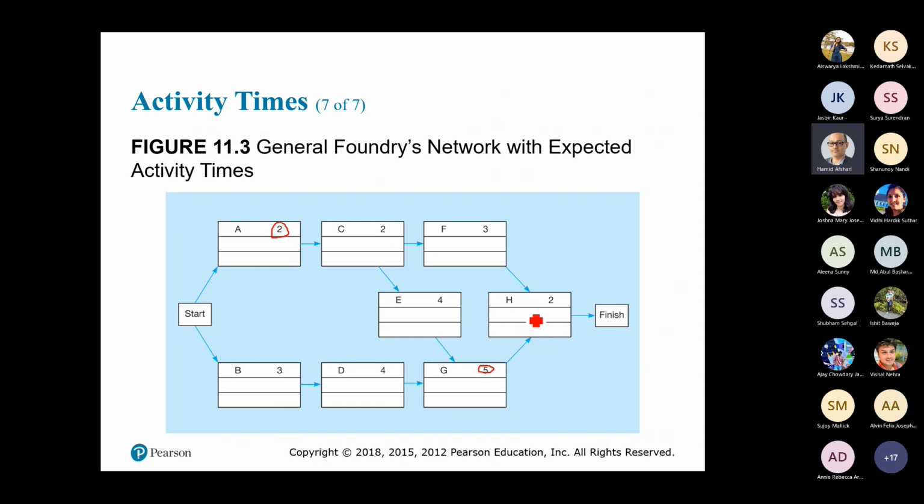Just pay attention that the two activities, start and finish, are dummy. They are not realistic activities. So that's why the time required for start and finish is equal to 0. That's right. So the time you need for activity start and finish is 0.